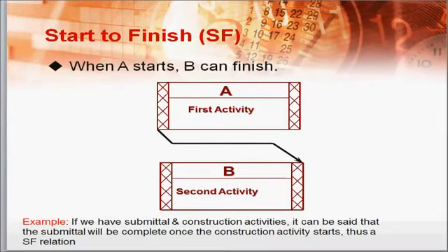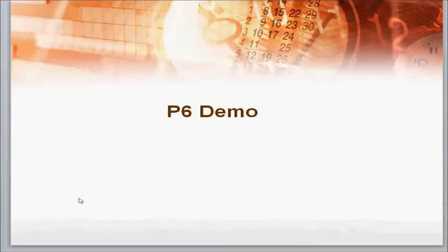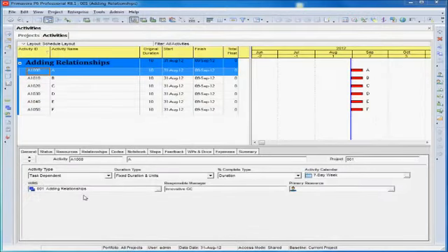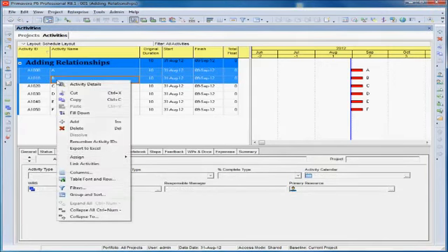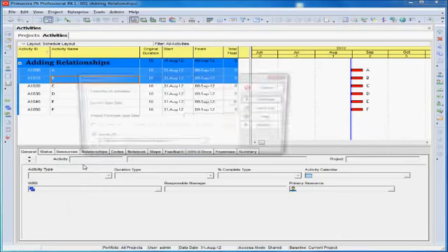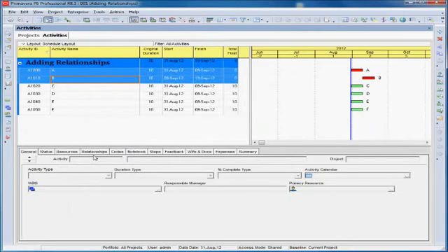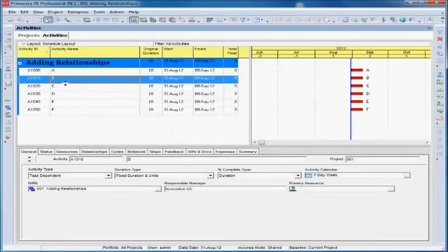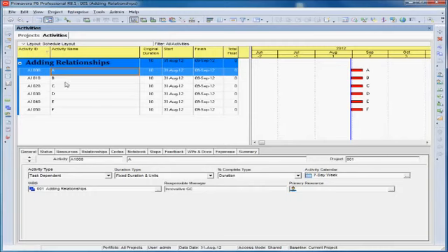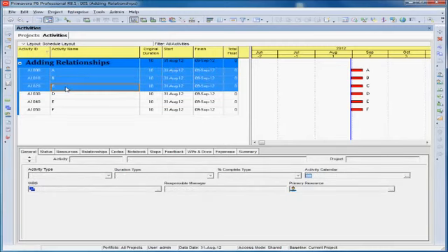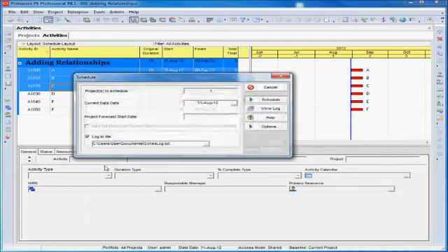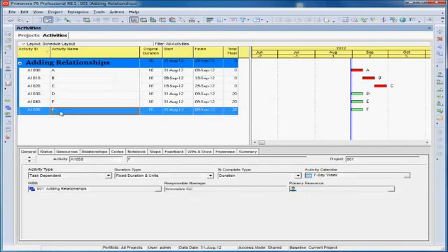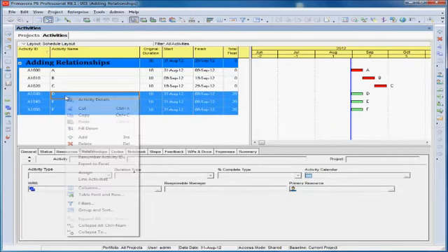There are different methods of linking activities. Let's try it together. The simplest is clicking on an activity and its successor, and then right-clicking and choosing Link Activities. If you wish to undo this, you click Ctrl-Z. The order that you click on the activities is the same way that it will be linked. For example, if you choose A, B, and C, and then click on Link. If we do the same to F, then E, then D,